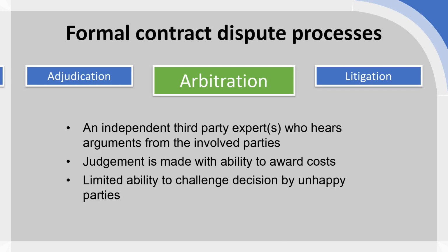It is worth stating that in the previous cases of mediation, conciliation, and even adjudication, both parties or all the parties involved obviously have to agree to go forward and meet in a negotiation with a mediator or even an adjudicator, and this is broadly the same case for arbitration. There has to be consent and agreement. However, in certain industries, there is a legal mandate to go forward to arbitration, so it's necessary to get a dispute resolved by an arbitrator.